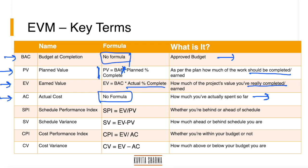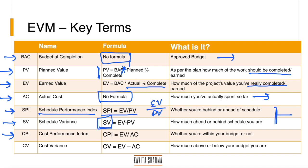Now, how do we find out how the project is doing? SPI (Schedule Performance Index) tells whether the project is behind or ahead of schedule; formula: SPI = EV ÷ PV. Schedule Variance (SV) = EV − PV. CPI (Cost Performance Index) tells how the project is doing with respect to cost; formula: CPI = EV ÷ AC.